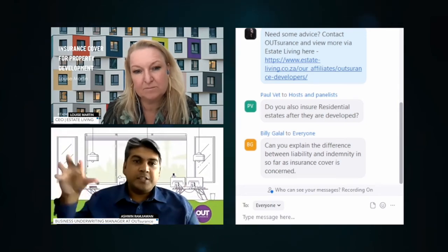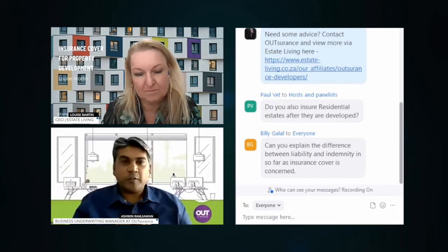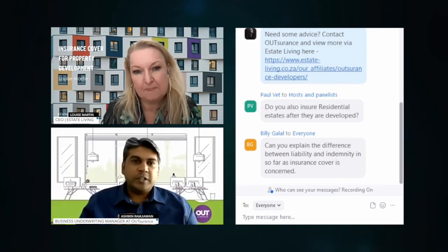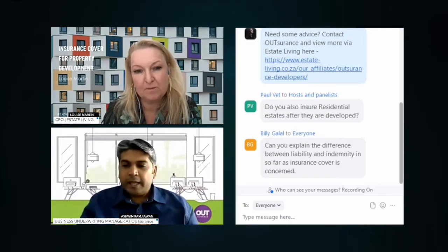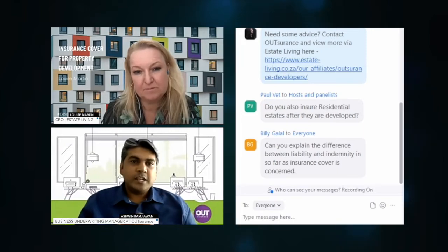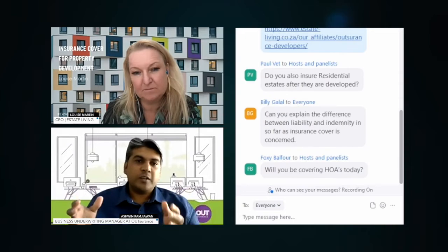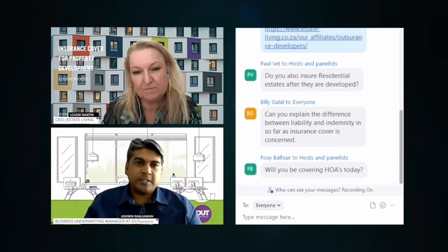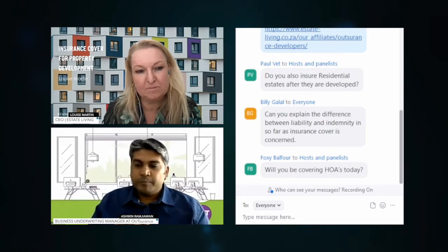So you can take out cover for loss or damage for that offsite storage. Again, typical building materials and things like that you would need cover for. Then getting the stuff from that offsite storage to the contract site, you might consider goods in transit cover. So contractors all risk also encompasses a bit of goods in transit, and it's one of the optional covers that you can consider if and when you need that particular cover.